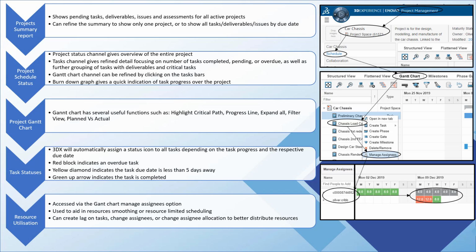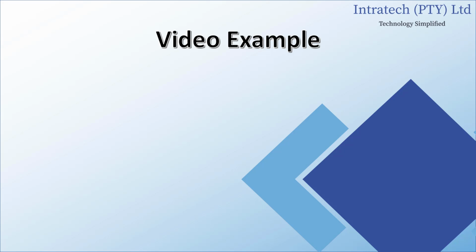When member allocations are under or overutilized, the project manager must go back to the schedule allocation pages and modify task assignments, allocations, or add delays to tasks to compensate for the resource issue. Delays can be implemented from the Gantt chart page by double-clicking on the dependency line and modifying the dependency. We will now go through these first 5 steps.